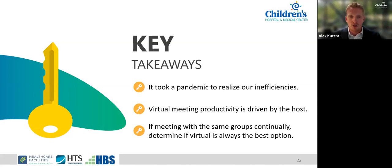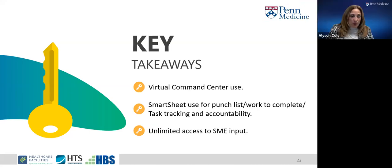So Allison, how about yours? Thanks, all great points. I think Alex had showed a picture of his virtual command center, representing the first time that folks were in person and offsite in some numbers. This is something that at Penn Medicine, I don't think we'll ever really pivot back to the old way. We used virtual command centers throughout our patient move, throughout the entire building activation, and then post activation in the 2 weeks following, really having a command center 24/7.